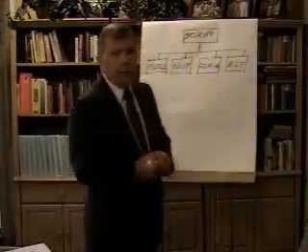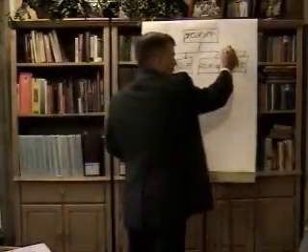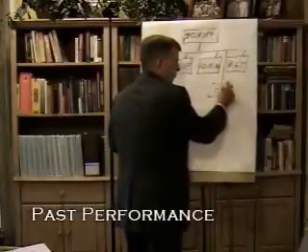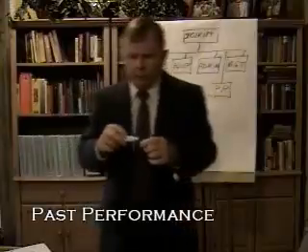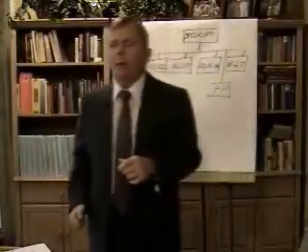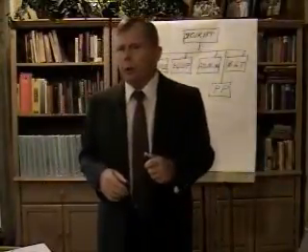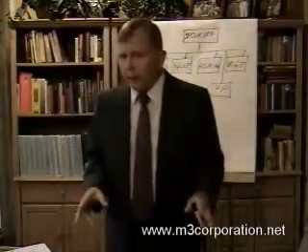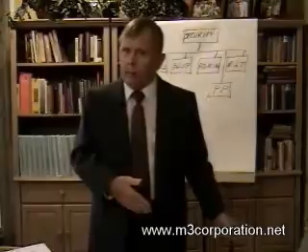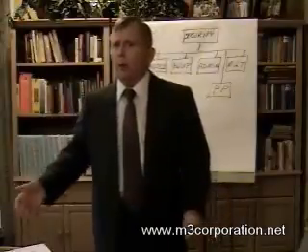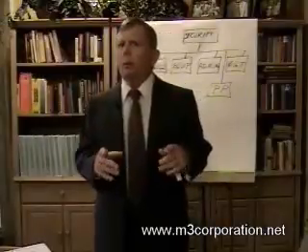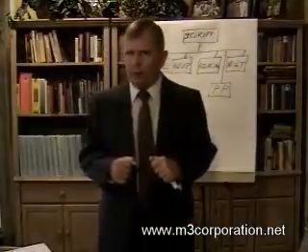In addition to this, we're going to have evaluation of the contractor's past performance. Past performance is always an evaluation for every acquisition that the government makes over $100,000 for the Department of Defense, $1 million for most other federal government agencies. But past performance always must be an evaluation factor.